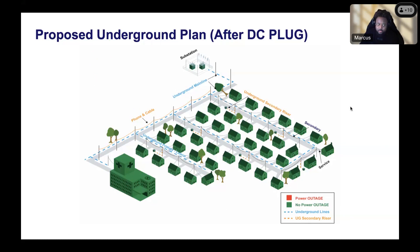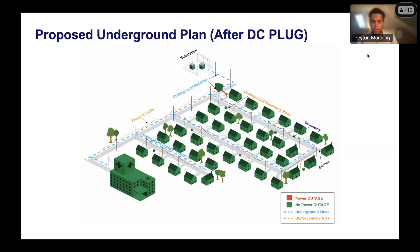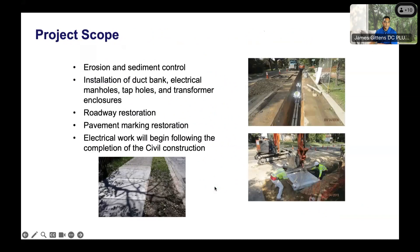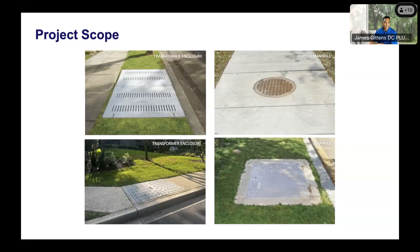On transformer locations: the design is still in progress, but typically transformer placement follows where the overhead transformers currently are. If you look up and see an existing overhead transformer — those gray bucket-like devices on poles — there will likely be an underground transformer installed nearby in the sidewalk.